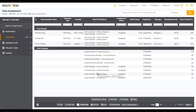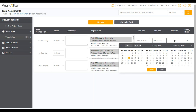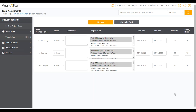If I need to make changes, I can either go right back in and add additional roles or team members, or I can edit the team or edit the roles. Let's go edit the team. Because forecasting was set as one of the team forecasts, notice I have some options for start date, end date, and percentage of time or weekly hours — we covered this in depth in the forecasting training. Also notice that it brought in their default roles, so Doug is a project manager and a test coordinator because that's what it says inside Doug's personal profile.